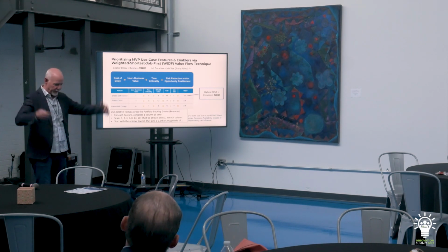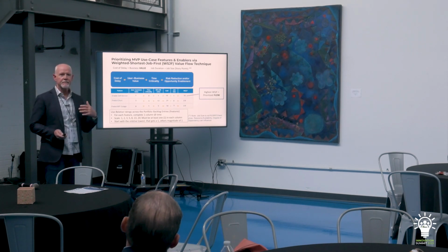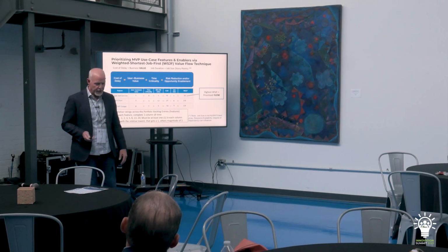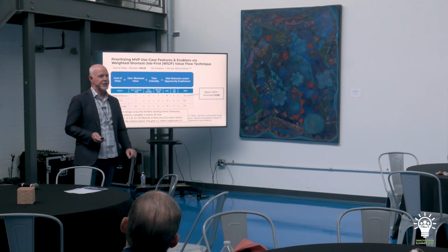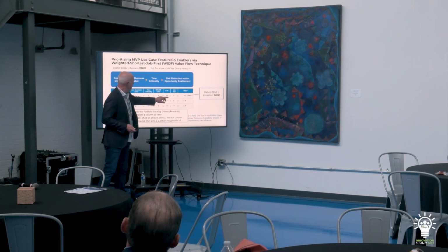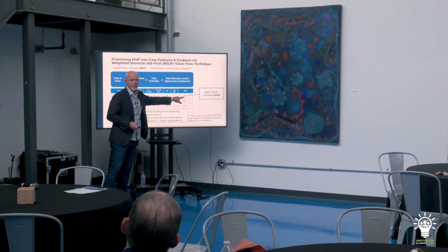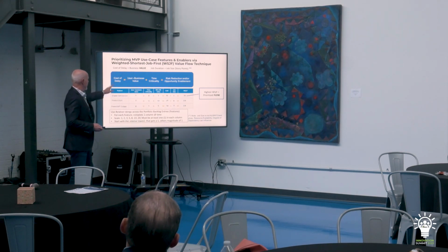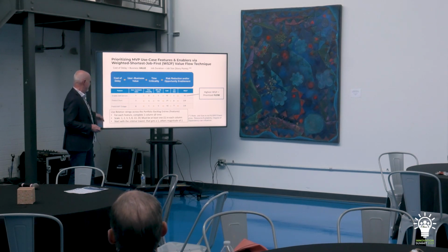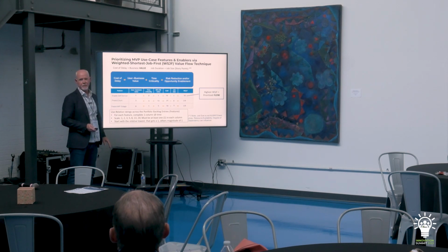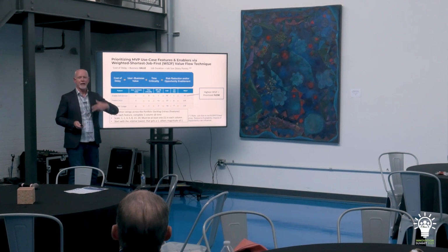And then what we want to do is, okay, I got all these features, but what's the next MVP? What's my prioritization scheme for making that happen? A technique that Lean suggests is the weighted shortest job first, which pretty much says the higher score here means the most, relative to all the other features, that's going to give me the most value in the shortest amount of time, right? And then you take the business through a ranking exercise. I won't go through the details, but it's pretty much what value is it? Relative to all the other features, which one gives you the lowest value? That gets a 1. And then from there, it's just order of magnitude, more value.